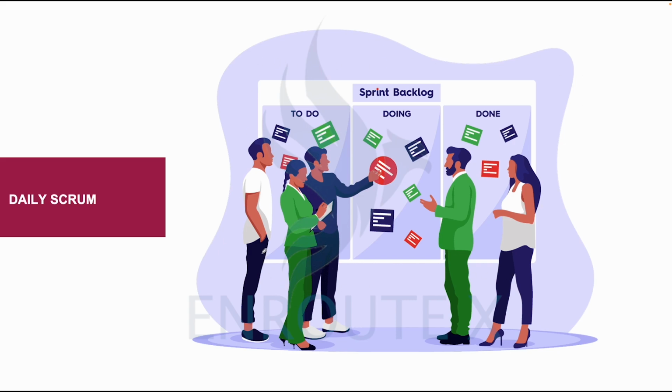It's a Scrum event that is for the developers themselves. The product owner is not mandated to be there, though most product owners attend daily stand-up. The Scrum Master should be there because he's supporting the team members and ensuring that they have value from all their conversations.